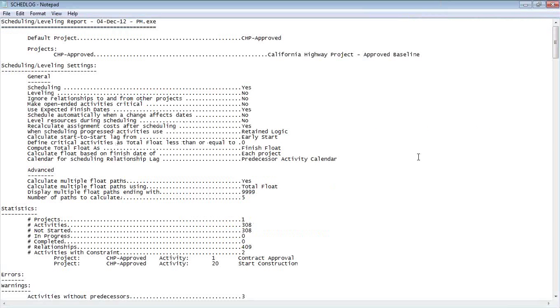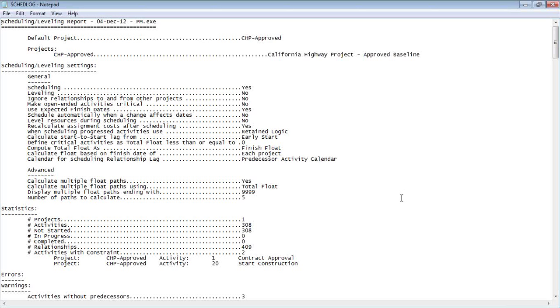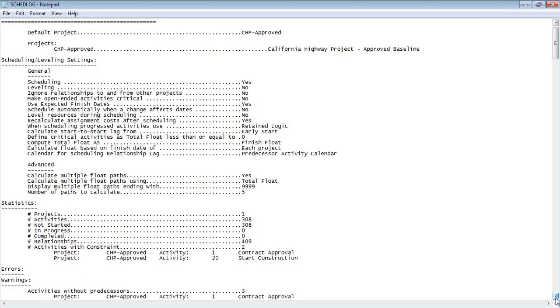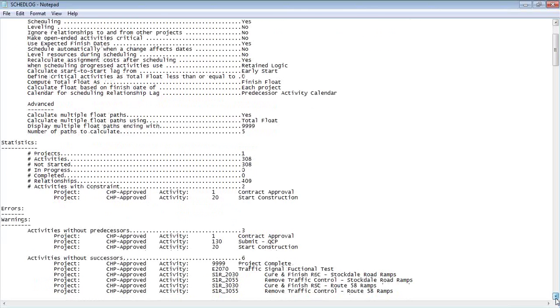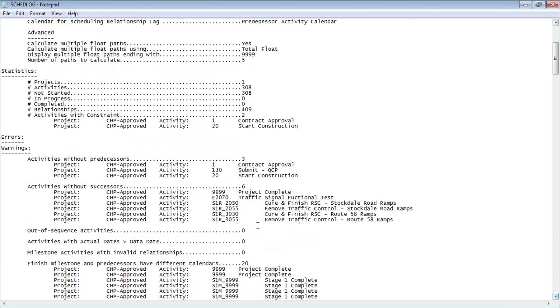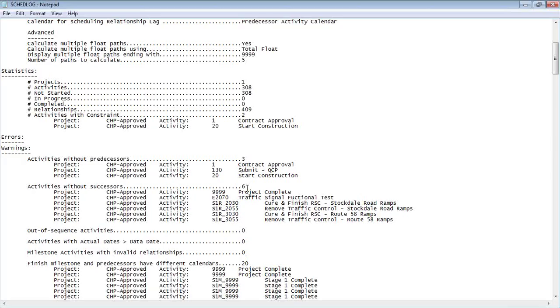Now, there's a lot of useful information here. In one of our other videos, we talk about the meaning of some of this information and why you should be checking it every time you publish a schedule. But what we're going to focus on today are the warnings down here. And let me scroll a little bit further. And you'll see that we have three activities that are missing predecessors. It even tells us which ones. Likewise, I've got six activities missing successors.